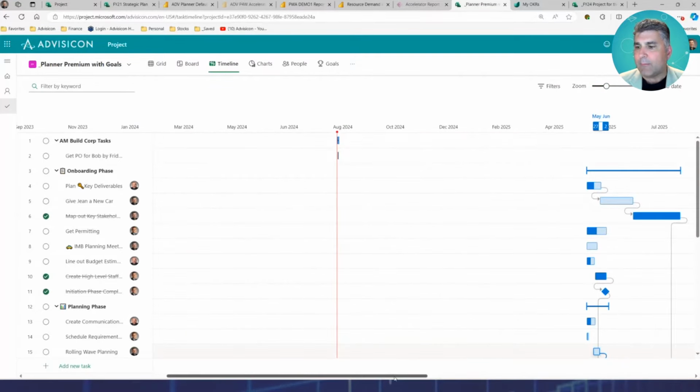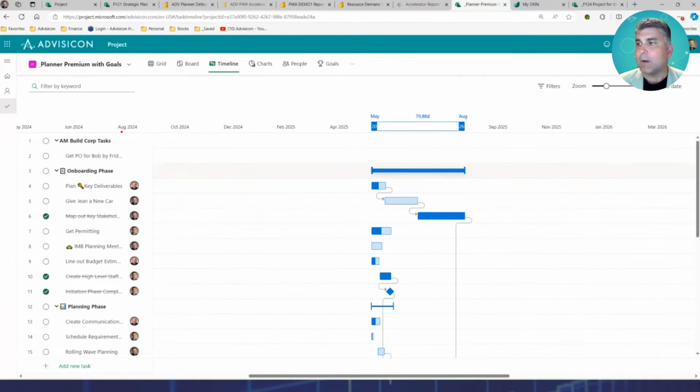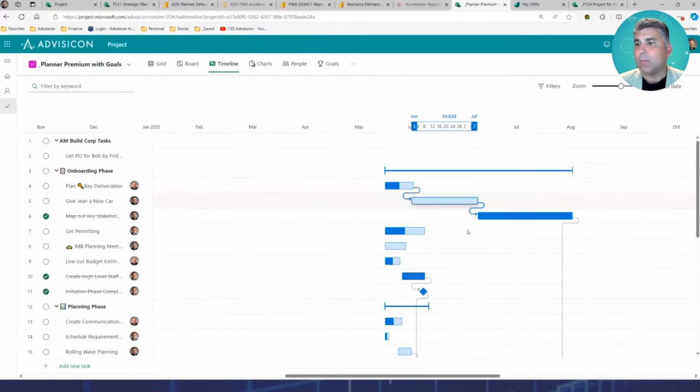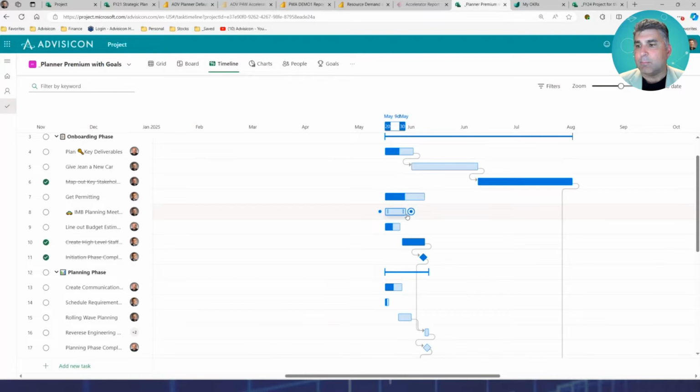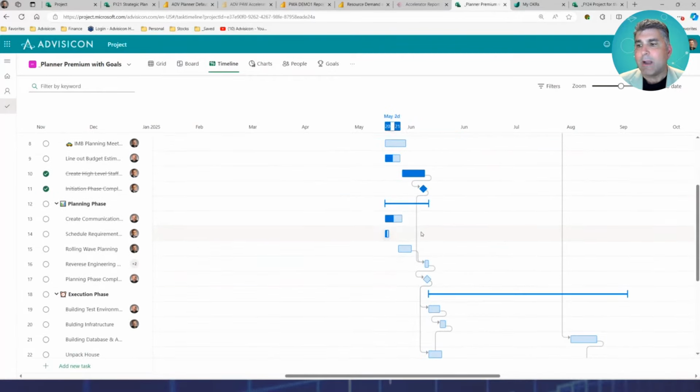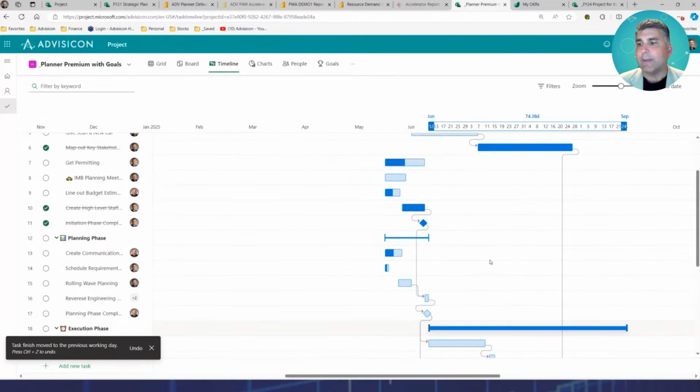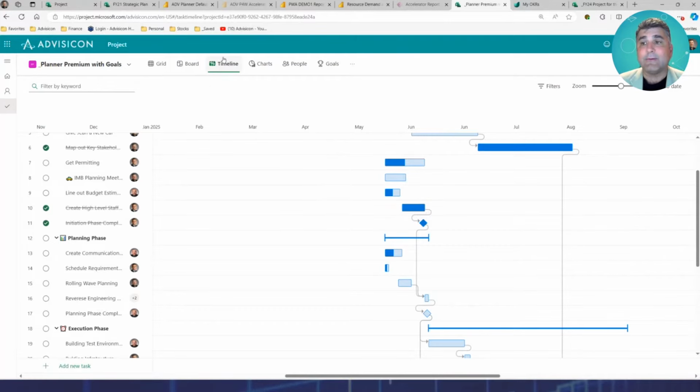And what's helpful about that, in fact, if you look here, is I can create project schedules that say, not only do the cards or the work activity that I'm working on have percent complete, we can track them, but I can have milestones, and we have dependencies so that if something slips, we see the impact on the overall schedule. And again, this is where we begin to say, not only do I have a timeline, but if you look on the top here, we actually also have goals.